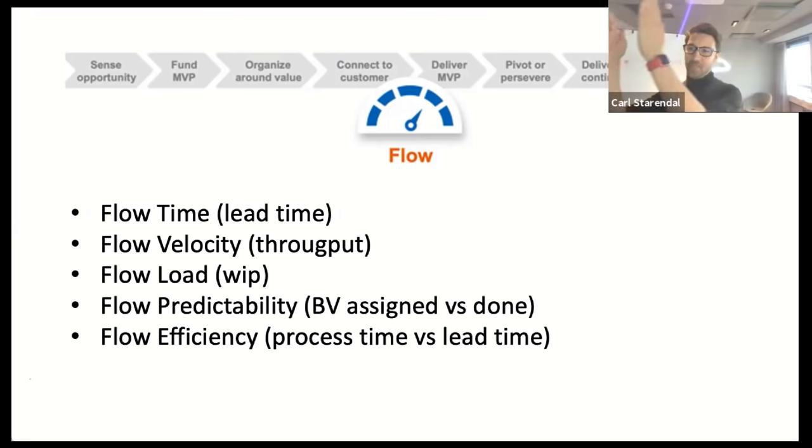How long did it wait to get to deployed to the car where it's going to work? And how long did it take? So I'm looking for process time versus lead time in each step. Takes a little bit more work, so this is not the first thing I would do. This is sort of, I'm now doing the first 4, I would get here.